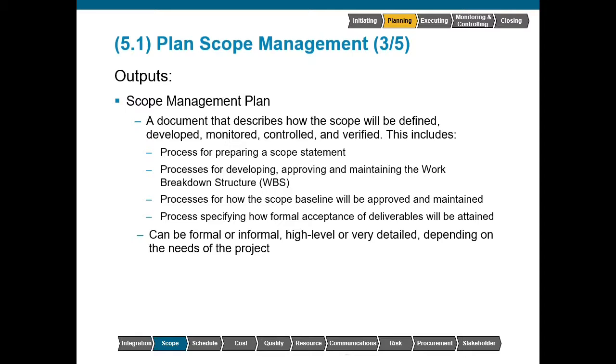Now, this plan can be formal or informal, high level or very detailed. It's going to depend on the project. It's going to be a very different situation if we're doing a very simple project, all things being considered. If you pay me to repave your driveway at your house, the acceptance basically becomes, has all the permitting been done correctly? Is it level? And have I cleaned up any mess that we might have made in the process? That might be it for the acceptance.